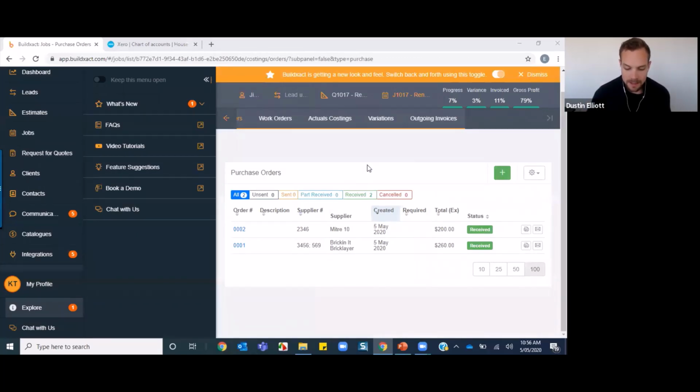The first one here is relating to markup that you would have done on the variation, and specifically asking, would you apply a negative markup for those items that you are giving money back in the variation? No, because as you noticed, it didn't pick up the markup from the original item. And look, negative markup doesn't really work in the system, so it's not recommended that you do that.